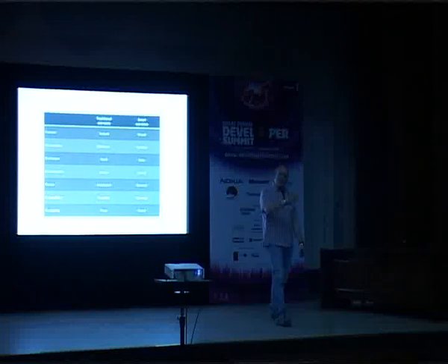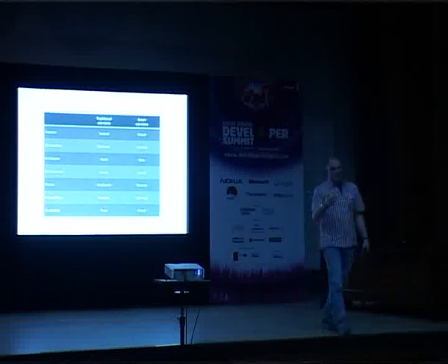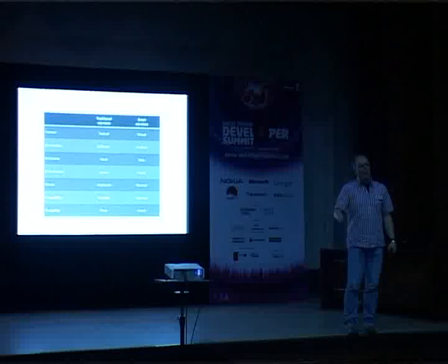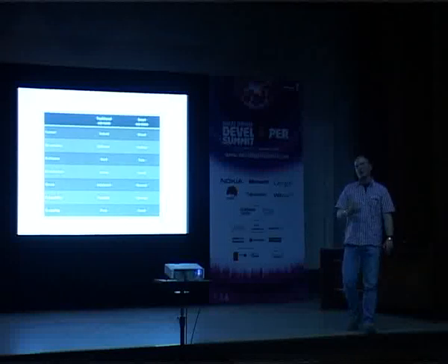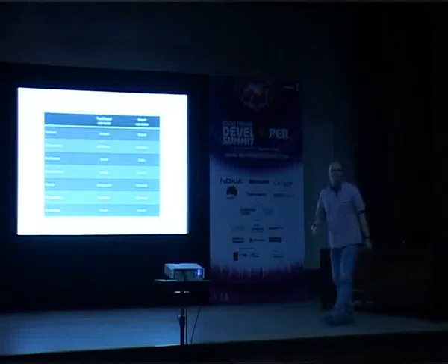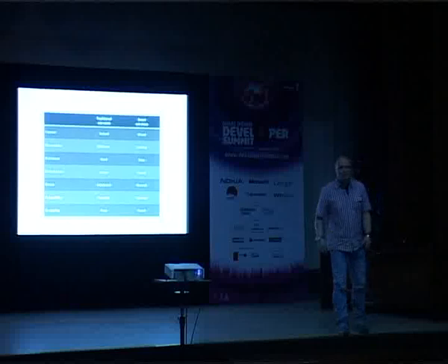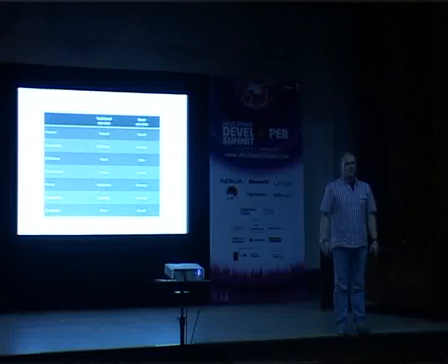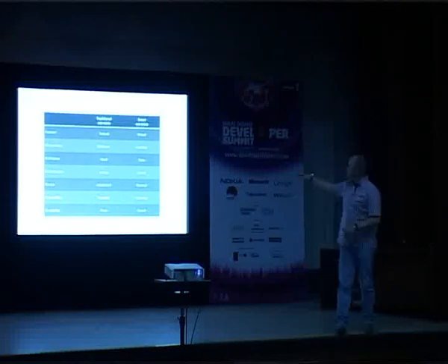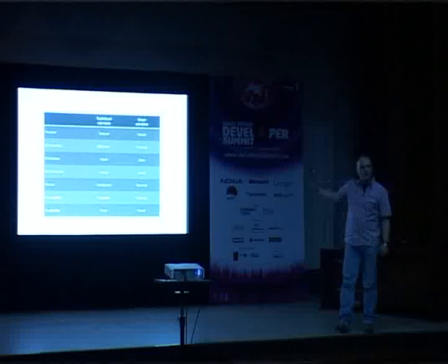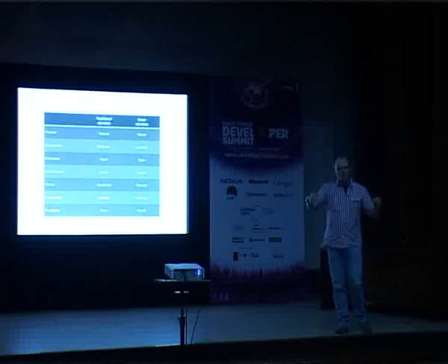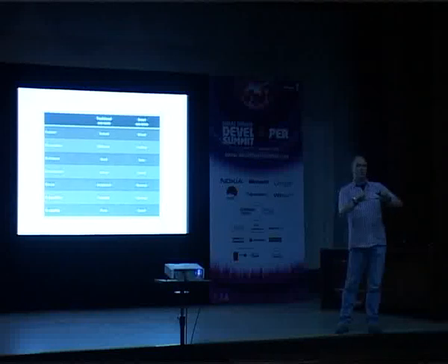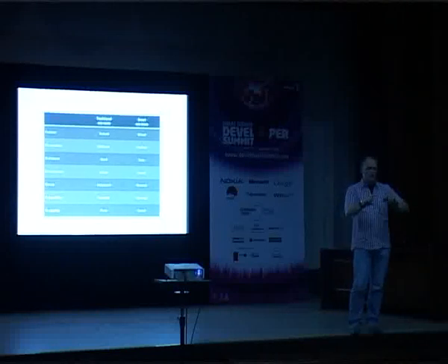And given the fact that the law of large numbers also applies, you can actually estimate them really reliably without knowing so much about them. Because the granularity of the smart use cases, they're all similar sized and they're all small. So that means that the law of large numbers starts to apply to your estimation.